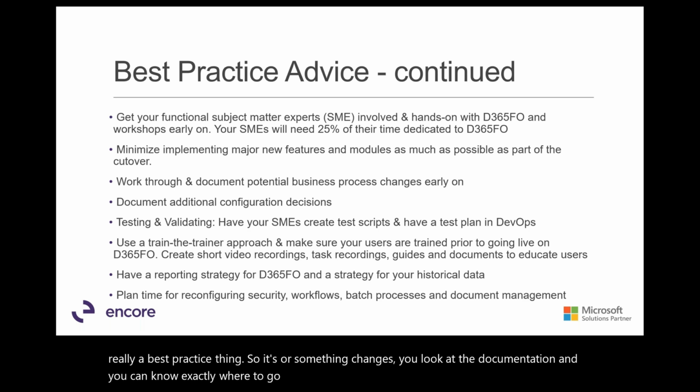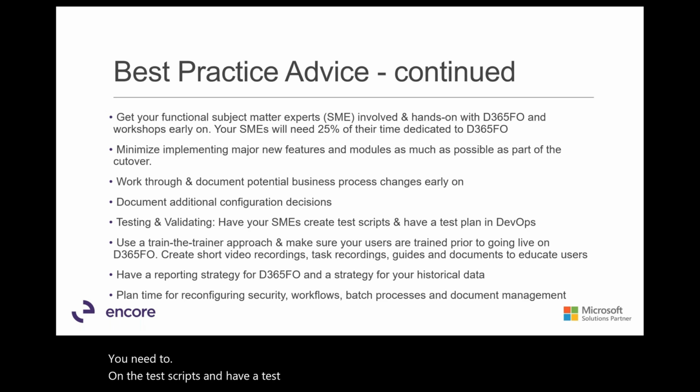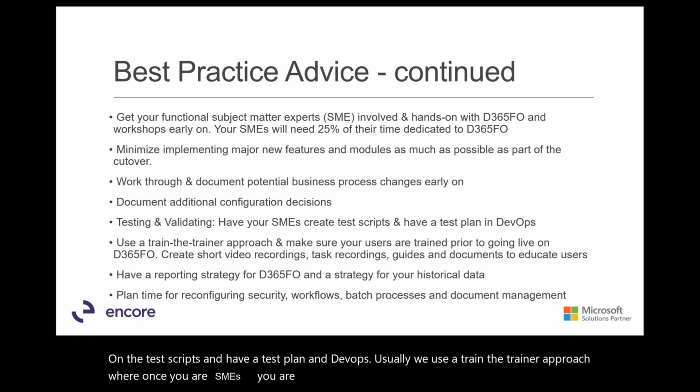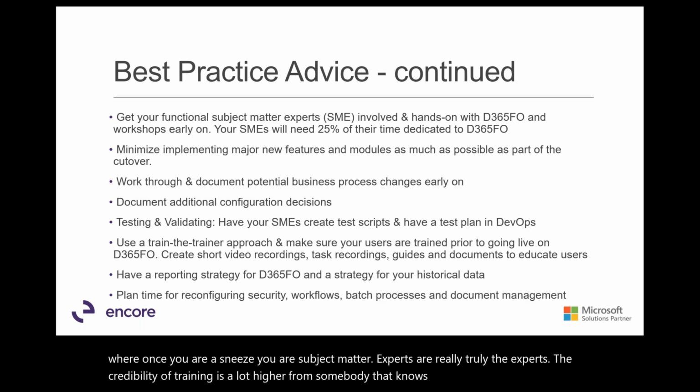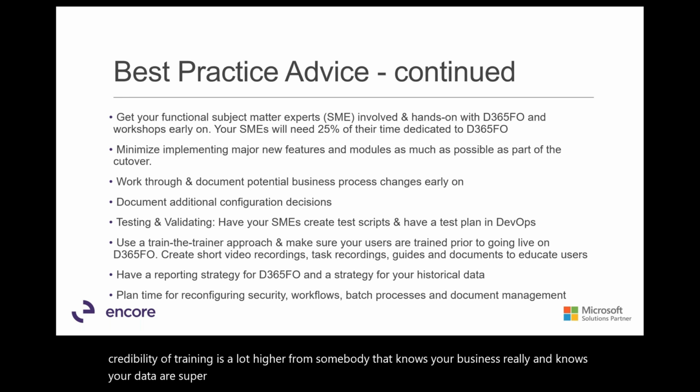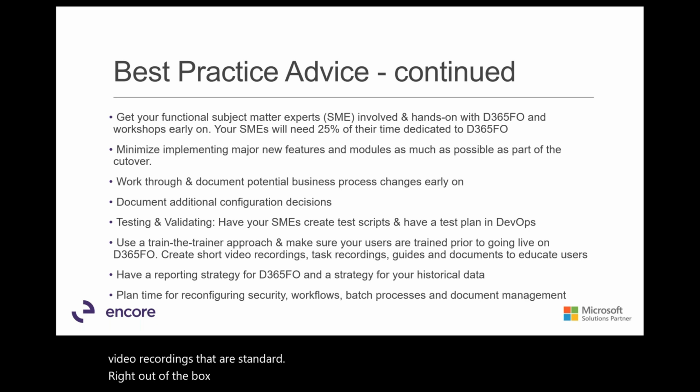Testing and validating cannot be underestimated. You need to own the test scripts and have a test plan in DevOps. Usually we use a train the trainer approach, where once your SMEs, your subject matter experts, are truly the experts, the credibility of training is a lot higher from somebody that knows your business really well and knows your data super well. So that's really recommended. There are wonderful Microsoft Learn video recordings that are standard, out of the box, but obviously you want your people to be trained with your data and your configuration.